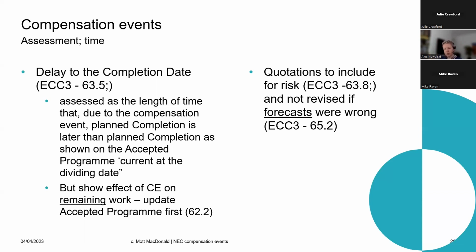If that was on the critical path, and it shifts the planned completion date up by 3 days, then we move the contract completion date by 3 days as well. If you think about it, it makes perfect sense. That's exactly what's happened. They've been delayed, everything slides up. So that's what we're doing here. This is what they're trying to describe in a really, really wordy way.